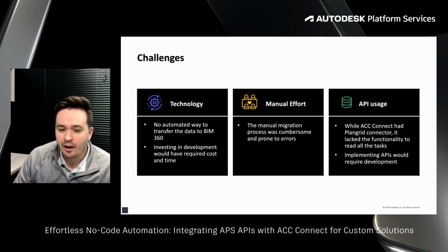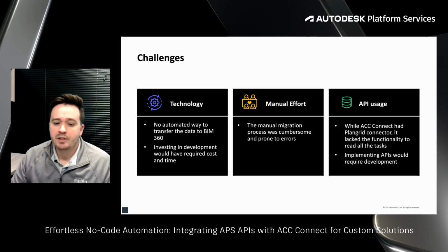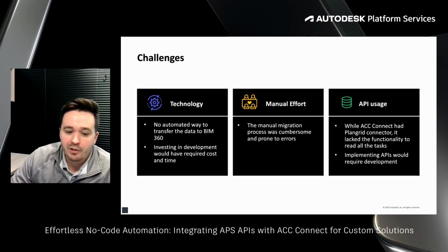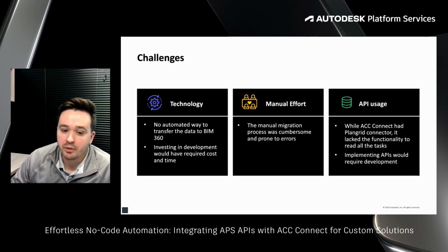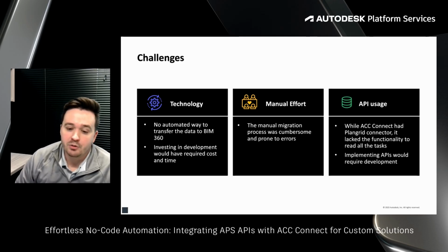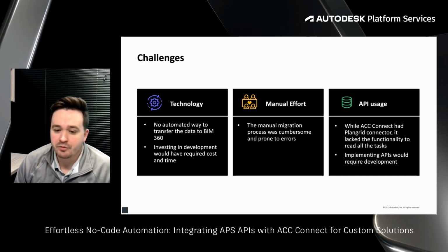Unfortunately, there was no out-of-the-box solution to do this, and since there were roughly 2,500 existing tasks in PlanGrid, manually creating duplicate issues in BIM 360 would have taken hundreds of man-hours, and there's really no efficient way to prevent user input errors on those 2,500 tasks.